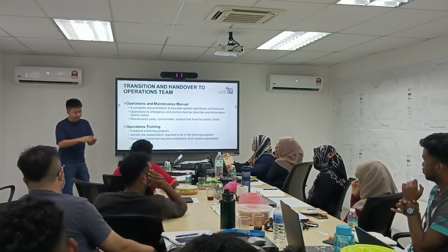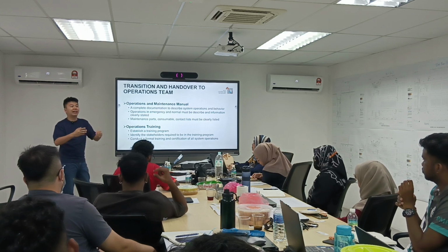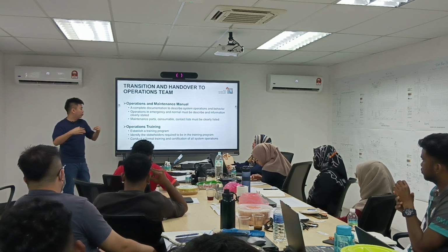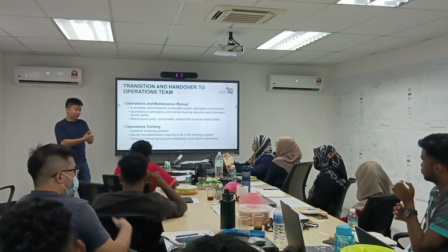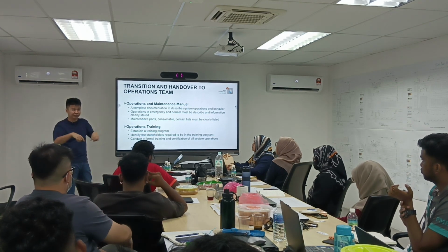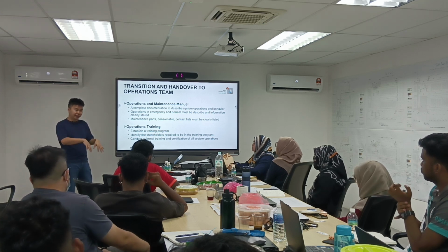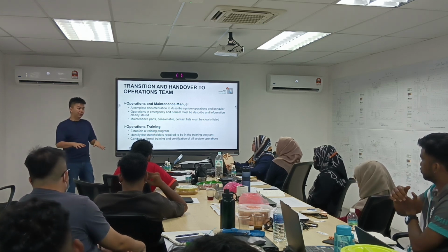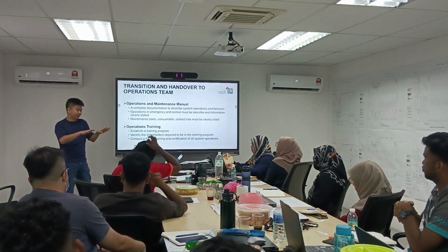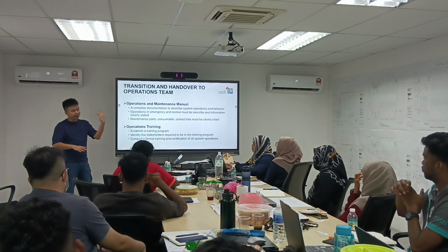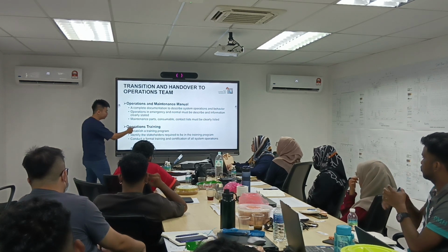Actually our UPS system, our genset system, our BMS system, they give you formal training and certification. If you finish the training by them, they give you a professional certificate. So we actually can run the certification as well. But in our case, in day one, we didn't do that. That's why if one day our operation team does something wrong and spoils the system, the principal will not give you warranty. So this is very dangerous. We should comply with the certification.